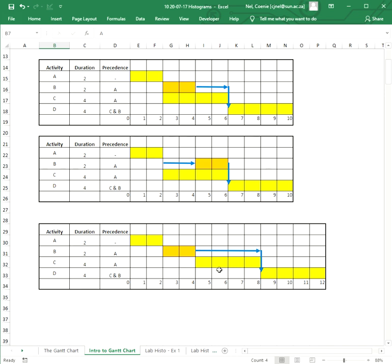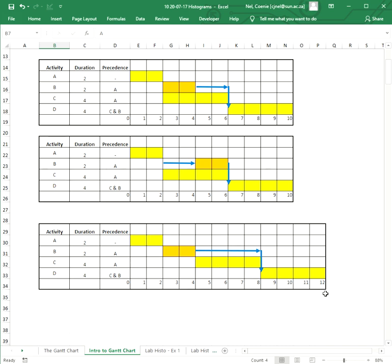And then we pack the rest of the project behind that. So you can say I'm not going to do these in parallel, although I can. I'm going to do that afterwards, and then I'm going to do activity D after that. So what I'm doing is I'm squashing activity B in between activity A and C, and by doing that I am increasing the full duration or the total duration of my project.